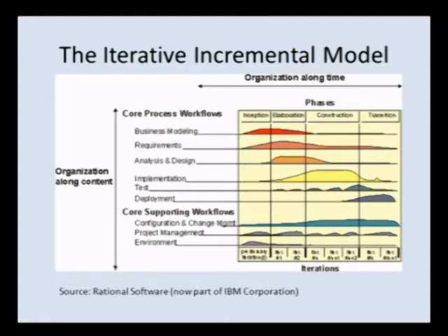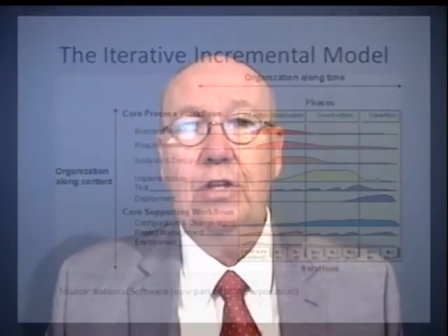Construction consists primarily of writing code and testing code. But we're still doing some analysis and design. Business modeling is pretty much behind us now during construction. And if somebody ran in and said, "Oh, I forgot, there's another feature that I want you to add," under this iterative incremental model, it would probably be possible to say, yes, we think we can accommodate that request, as opposed to under the waterfall model in which you would say, forget it.